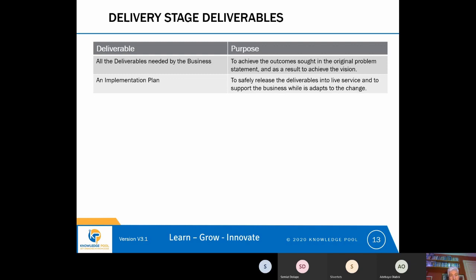The only time when those deliverables should be unclear is if you're using the agile methodology, when you can go into the delivery stage not quite sure what your deliverables are going to be. But using Agile, what you would know is how much time you would spend building those deliverables. And the delivery stage will end when that time runs out. The challenge for the project is to ensure that it's delivered all of the must-have requirements before the time runs out.